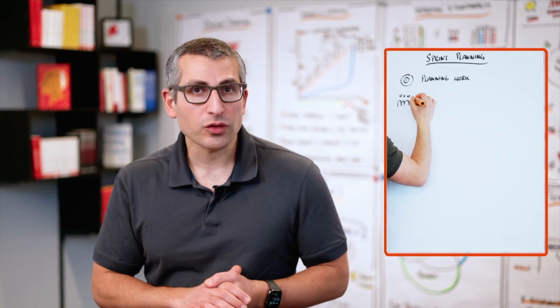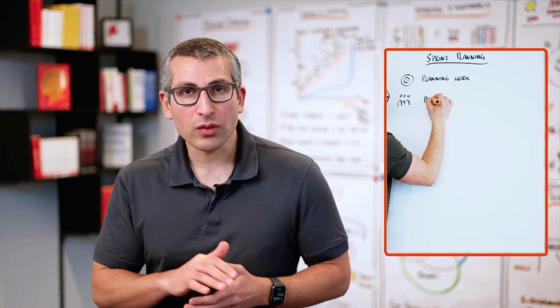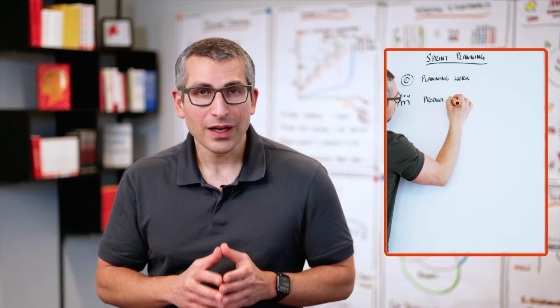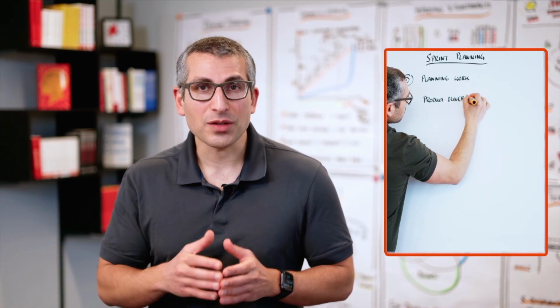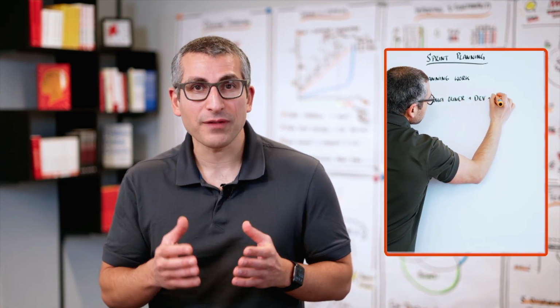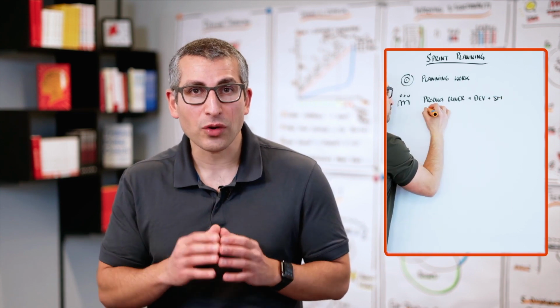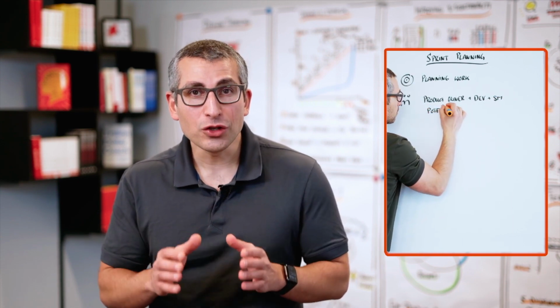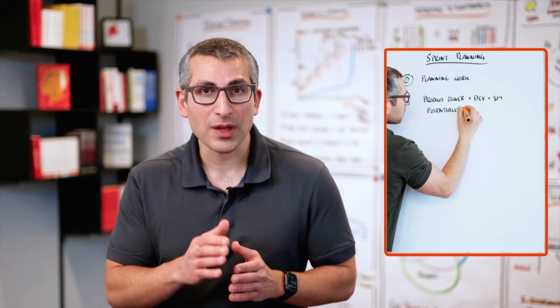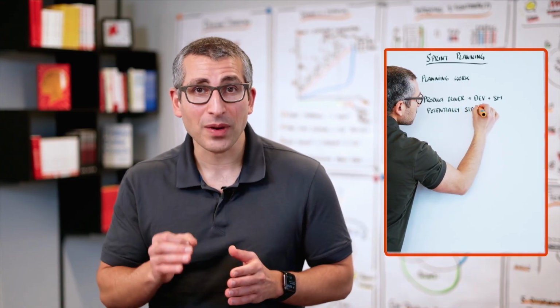It doesn't hurt to invite stakeholders, but only if they behave well. So if they start to challenge the priority that the product owner and developers agreed to in the product backlog refinement, you as a Scrum Master should interrupt them and tell them that this is not the place to do that.